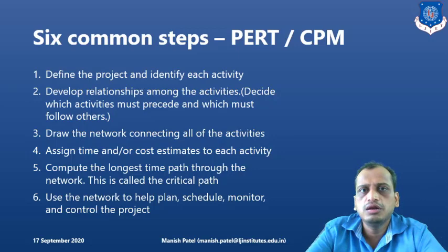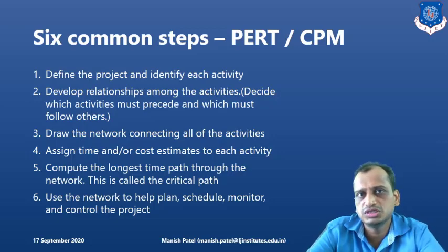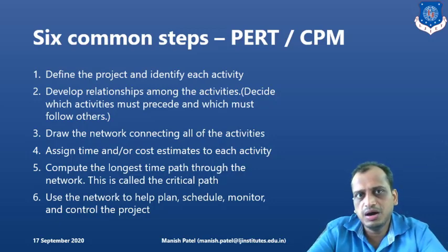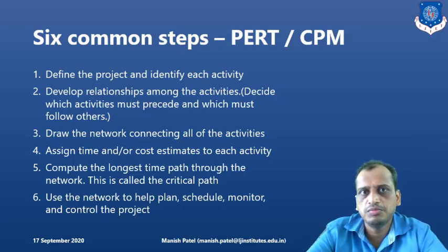What is the next step? We will try to find out the critical path, or you can say critical time. In finding out the critical path, we find the critical activities which are contributing towards the completion of the project. We have to concentrate on these activities because they are contributing to the delay. If any delay is there in these activities, it is going to delay the overall project duration. And hence, once we get this critical path comprising these critical activities, we can easily monitor this project. We can plan beforehand which resources to involve so that we can effectively control the project duration.